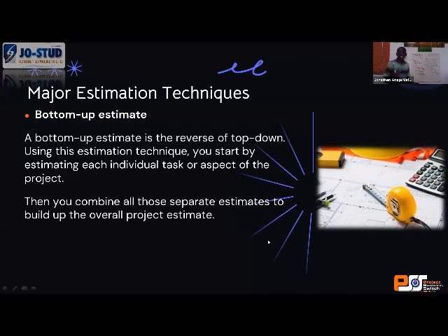Or if you have a QS in-house, or you even have experience, you can call your foreman and ask him, okay, if I want to blind this foundation of 200 meters, how many bags of cement? So you can do it as a material and labor schedule instead of doing it as cubic meters, the way quantity surveyors do it. They use cubic meter, square meter area, and linear meters to cost their work. But you can actually use the foreman's method and just say how many bags of cement.